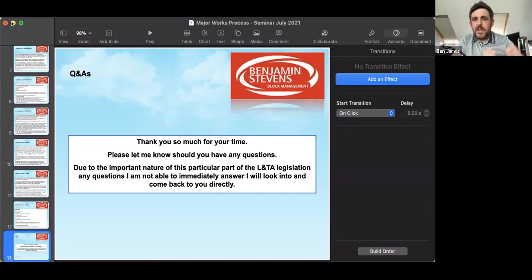All this information should be going into that folder on the central drive, and then that allows either myself or another member of the senior team or the managing director to sign off the project. And we're done. It might have taken 4 or 5 months, but we've been able to track that process and some of these points do have particular timescales that we can either stick to or ideally stick to. So at each point we can reset, whether it's an Outlook reminder or some other way of resetting that clock, so that each time it happens, we can stay as on track as possible.